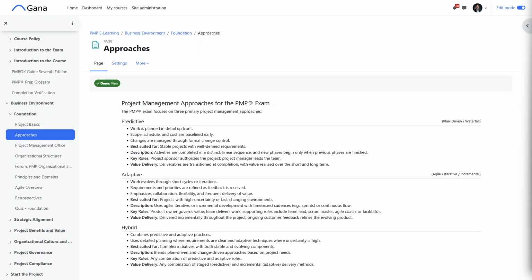In this case, we might be just talking about some type of software project, right? So we're not going to deliver the entire software completed. We would be looking at a value or a piece of the project that can give value to the customer, right? And so we're going to create that, and then hand that over, and then loop back again and create another value added piece of the project, hand that over, and we're going to keep looping through that.